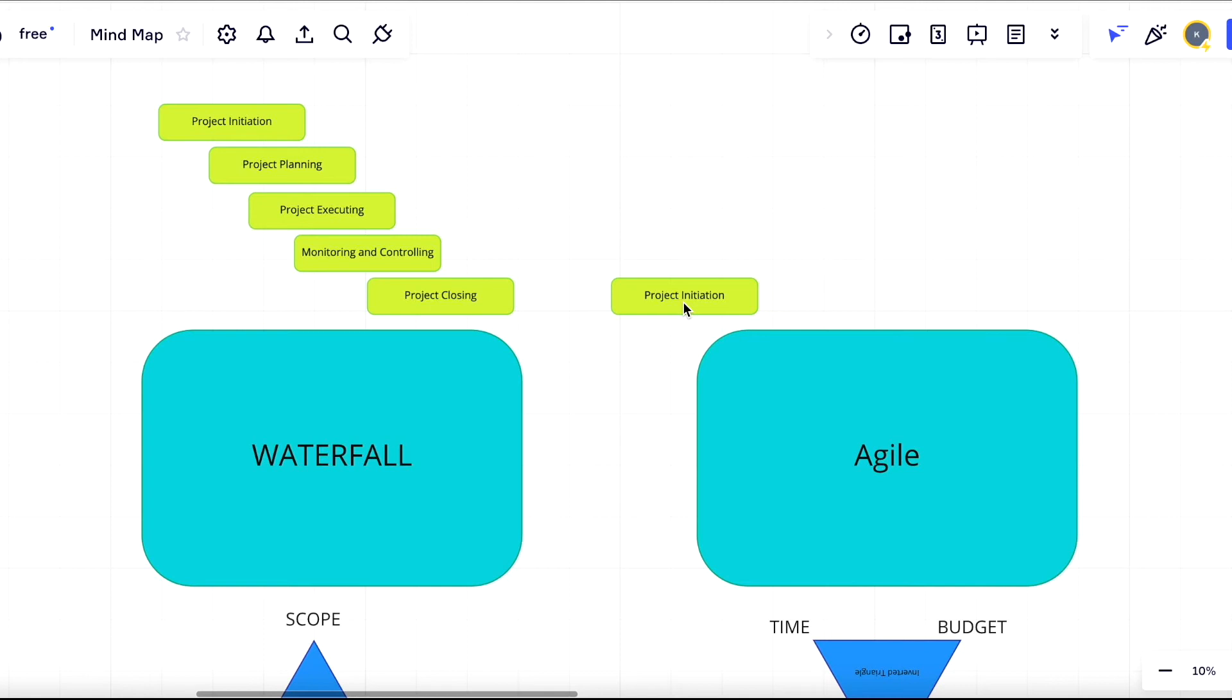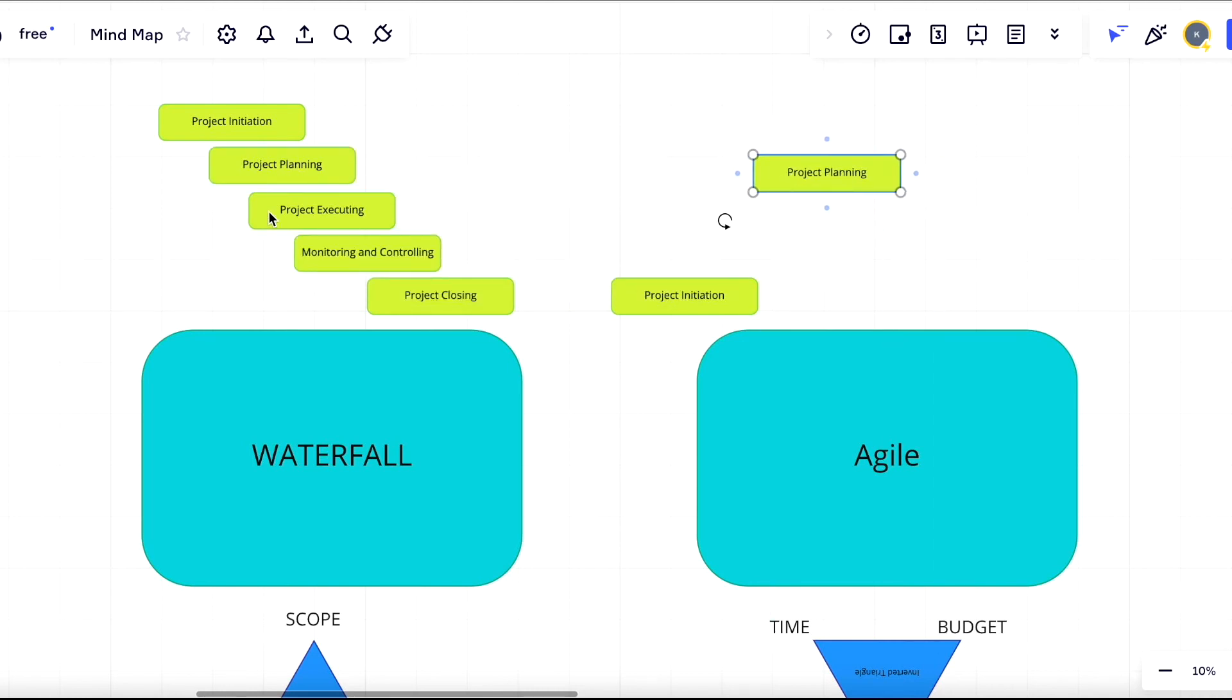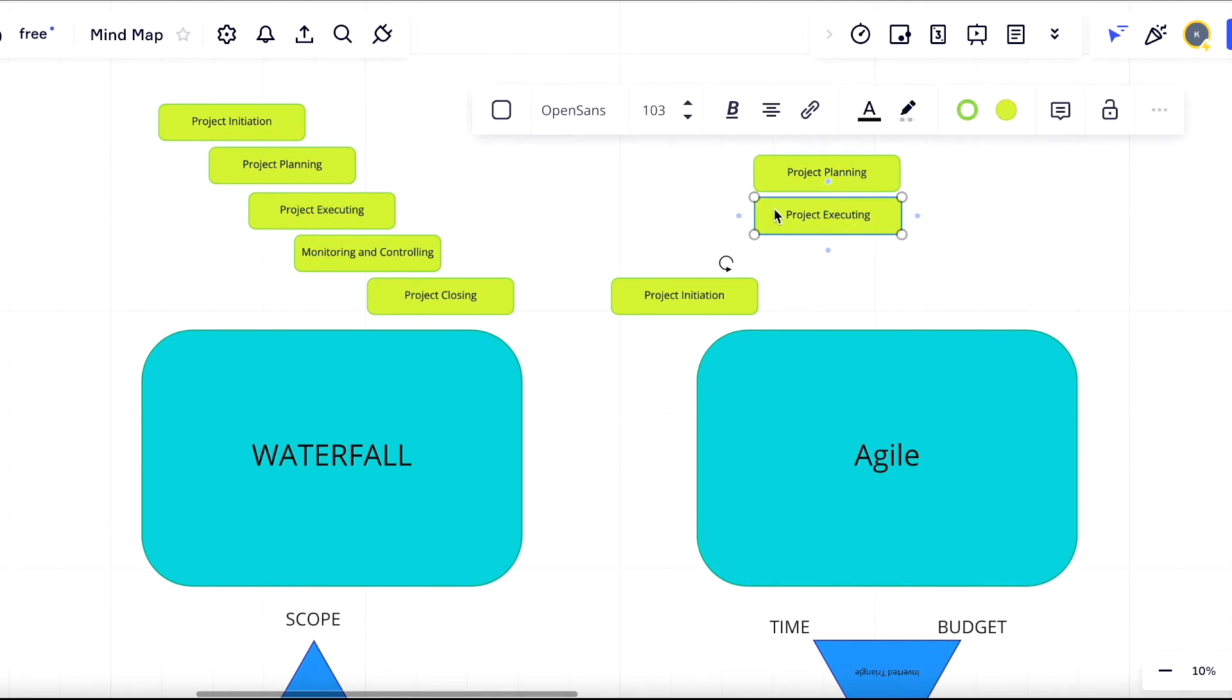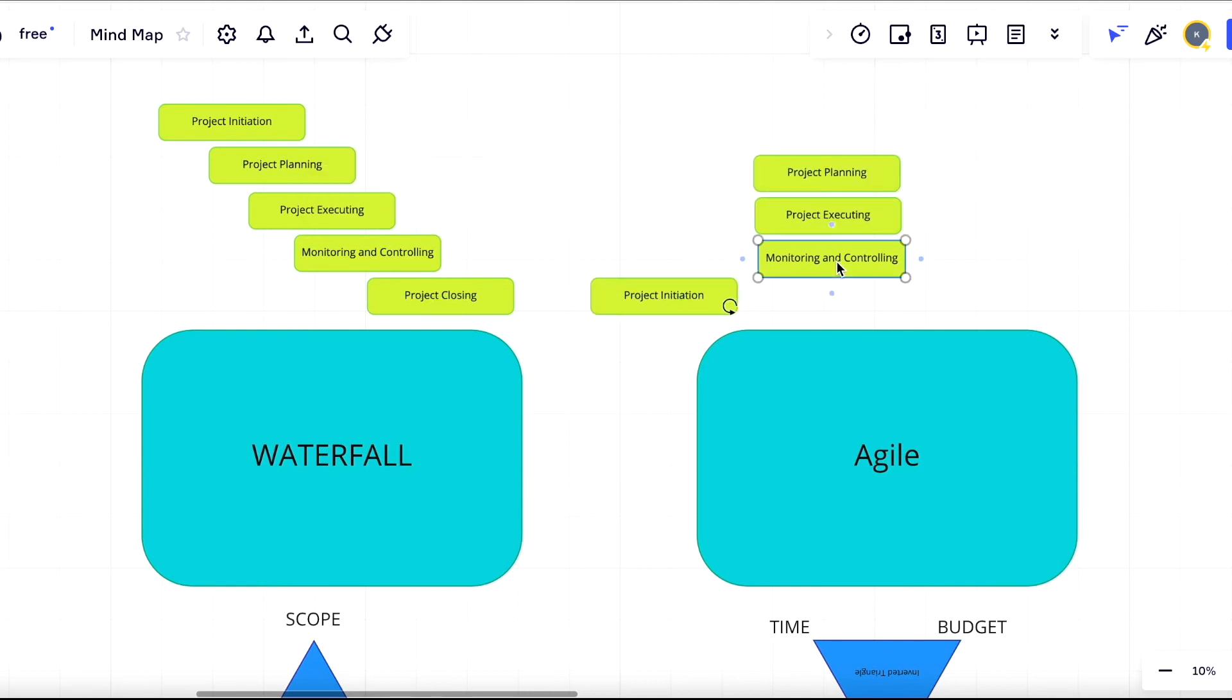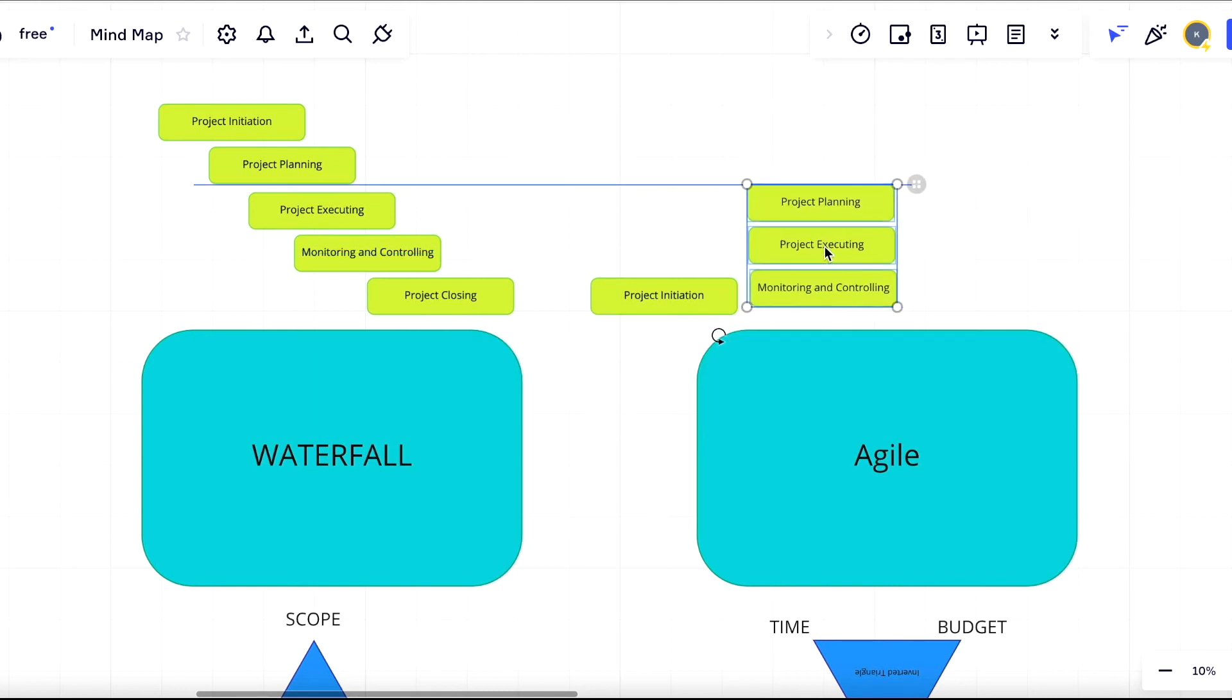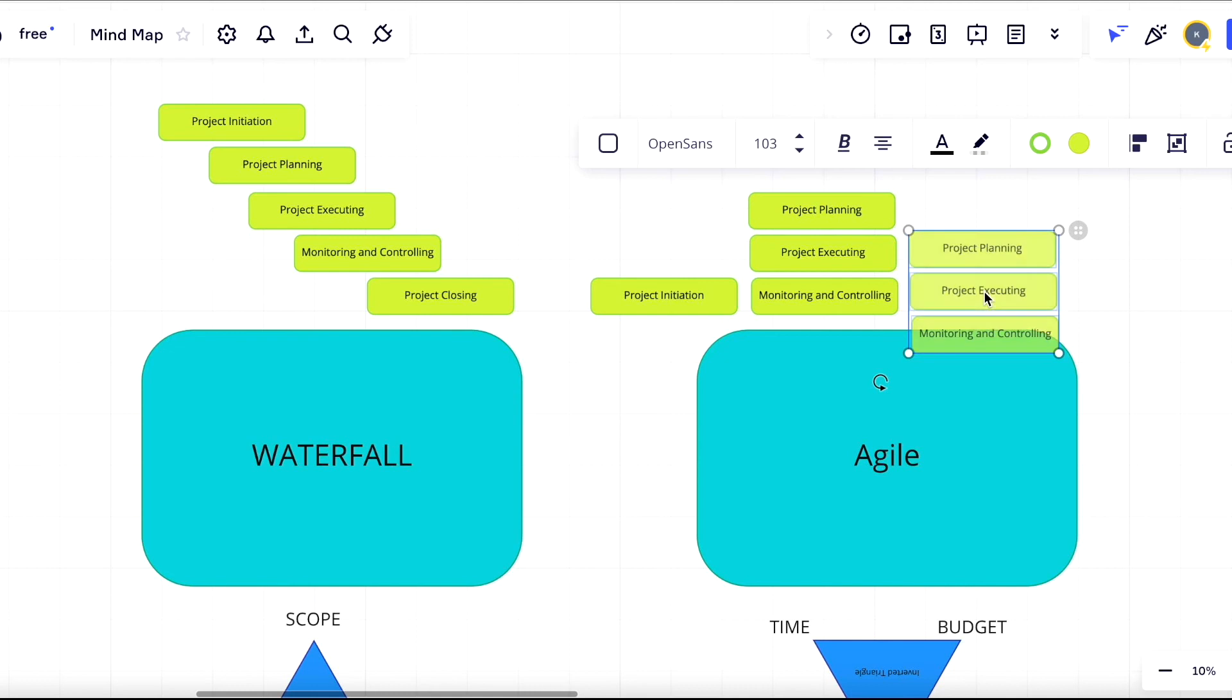We still have planning, executing, monitoring and controlling, and project closing, but how do we adapt all those stages within agile? With agile, we are working incrementally, so we are defining smaller pieces of work and delivering them to either end users or stakeholders to get feedback and be able to adapt and adjust the project scope. This means for each of that increment or attempt to get feedback and adapt our scope, we still need to execute planning, executing, monitoring and controlling in order to get done with this piece of the project and eventually receive feedback. So what we do with agile: we are planning, executing, monitoring and controlling multiple times.